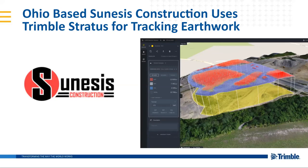And so what they had was an area where, after the demolition, they didn't really quite understand how much material they had, where it had to go, and kind of understanding that balance of plant, balance of site kind of operation. So they were quickly and easily able to fly that, run a quick volume of the stockpiles they had on site, and then start to get an understanding of, okay, here's the design we're going to create, put it into our machines, and from there track how are we progressing towards that?